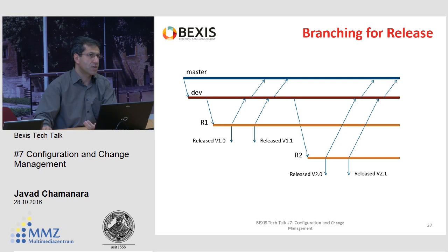So this is something that we try to avoid by keeping distance, time distance between the releases, like 3 or 4 months, which is practically enough to discover if there was any bug not identified during the releases. So in that case, we will either create these hot fixes as many as needed, or schedule the bug fix for the next release. But in emergency cases, there are some workarounds to have the fix on R1 also involved in R2. But this is something that, as I said, we try to avoid.